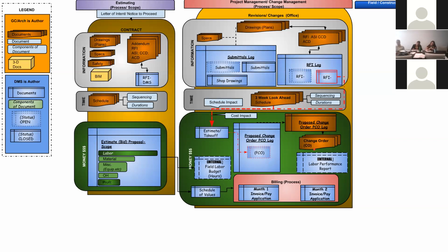When they issue change orders, they tend to issue change orders once a month. So if we're on a 5-month project, how many times are we going to receive a change order? Once a month. And that's why we need to be actively taking PCOs and putting them in the general contractor's hands to collect the change order, because if our project is only 5 months long, we're only going to have 5 opportunities to get these things resolved.